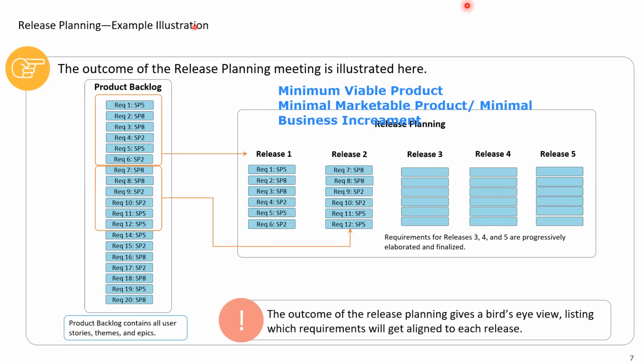Yeah, because tell me, what if the outcome was very poor? For example, I have launched a web page, I have done a Google ad also, and I didn't see many references from the web page. Will I go ahead with the first release? No. But what is the benefit? I at least got an understanding, and I can then improve my product and retry. It prevented me from investing heavily and incurring a loss. By a minimum investment, I came to know whether this idea will be successful or not. That is the benefit, right?